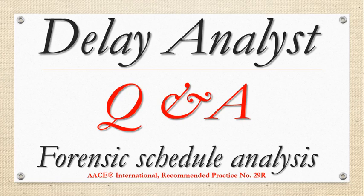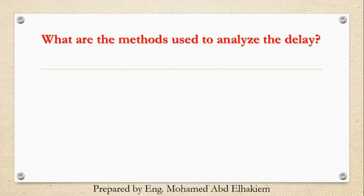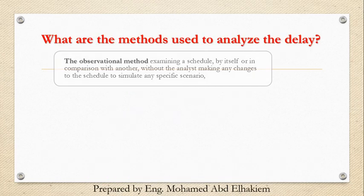Delay Analyst Interview Questions and Answers. What are the methods used to analyze the delay? The observational method: examining a schedule by itself or in comparison with another, without the analyst making any changes to the schedule to simulate any specific scenario.